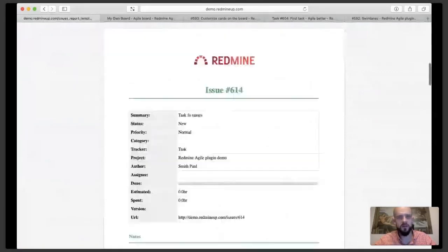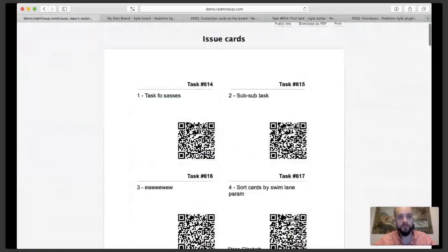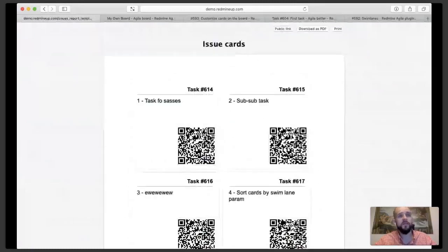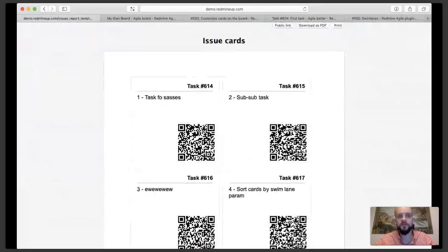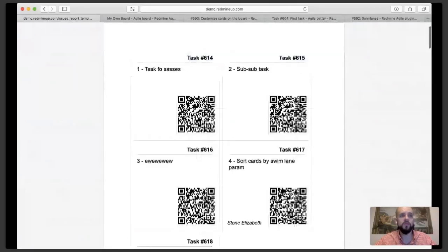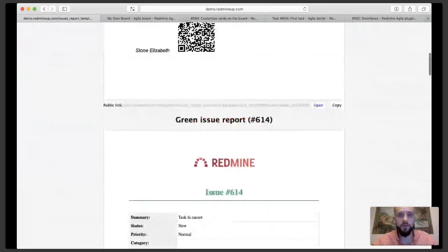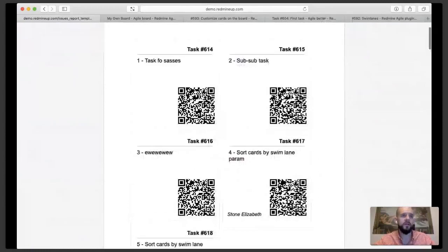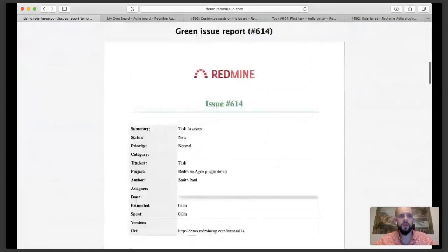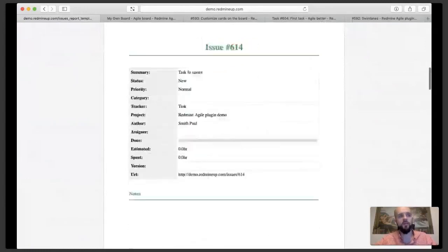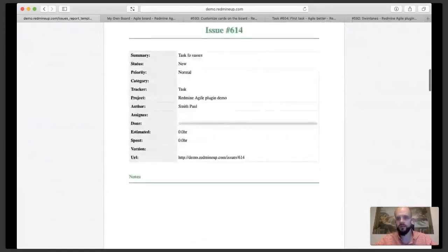Basically, it generates reports from issues, so from tasks. It can be in any form that you want. You can have cards, which can be used for planning, like to put on your offline physical board with the tasks. You can have a typical report with information. It can include notes and time. It can also do some mathematical operations. For example, you can take time spent multiplied by user rate, and it can be used for billing your clients.